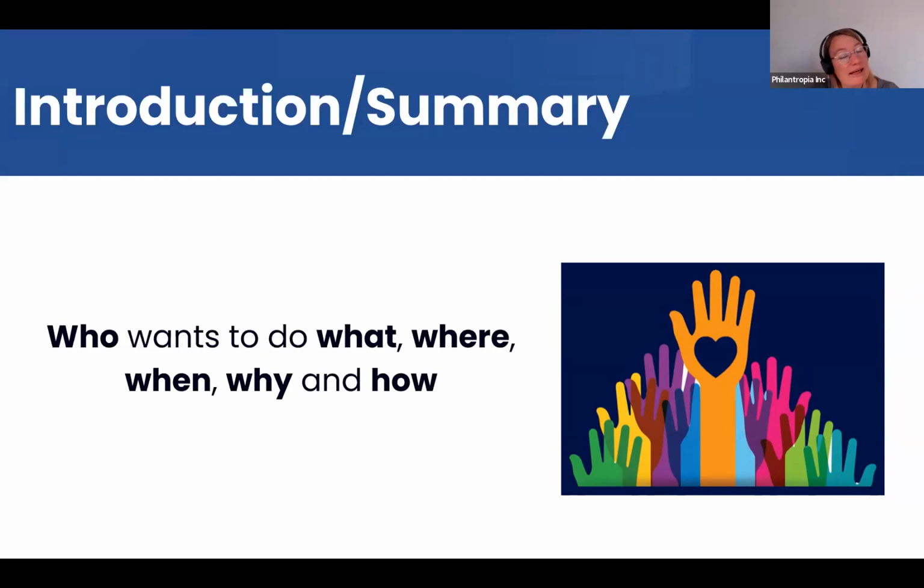But again, at the same time, keep it as short as possible, because people don't have time. A summary is supposed to be short. So if you have a 5-page proposal, don't write a 1-page summary. That's not the relation that it should be. It should be much shorter, and it should give a really quick introduction and a short way of understanding your proposal.